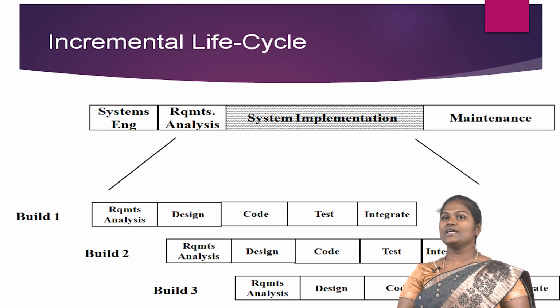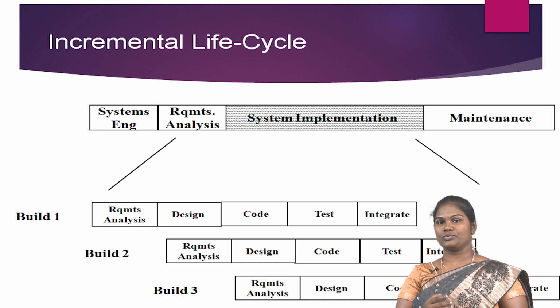The incremental life cycle is an adaptation of the waterfall model. This life cycle methodology is used for more complicated systems and systems where all the requirements are not known upfront. It breaks large products into a series of smaller deliverables called builds. In the later builds, requirements can be added based on customer feedback on the earlier builds. It also provides the opportunity to deliver limited functionality early in the project.